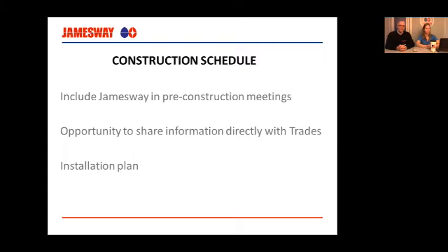The construction schedule also gives us an opportunity to reach out to other trades. So with pre-construction meetings and even meetings on site during installation, Jamesway should be included and invited to those meetings. It gives us an opportunity to meet with every trade involved in the project. We can share information with the trades about our machines, about our specifications and our needs, and it'll help the project go much, much smoother.